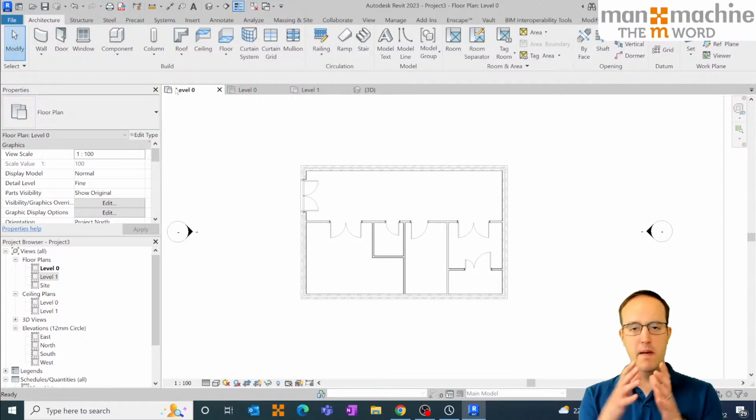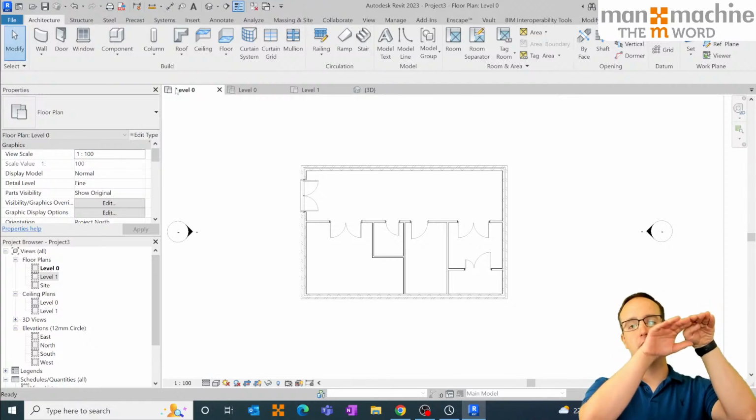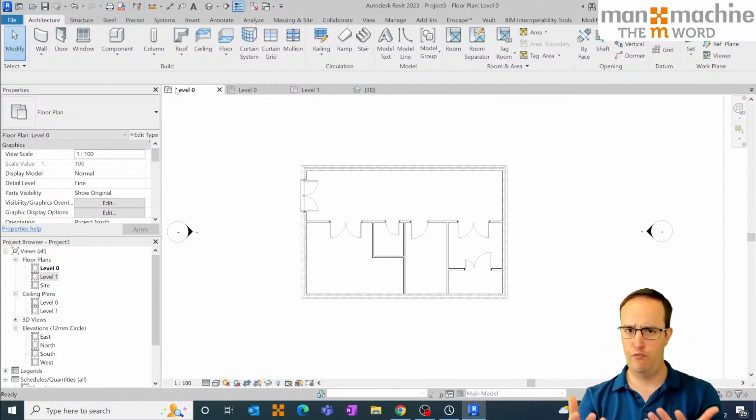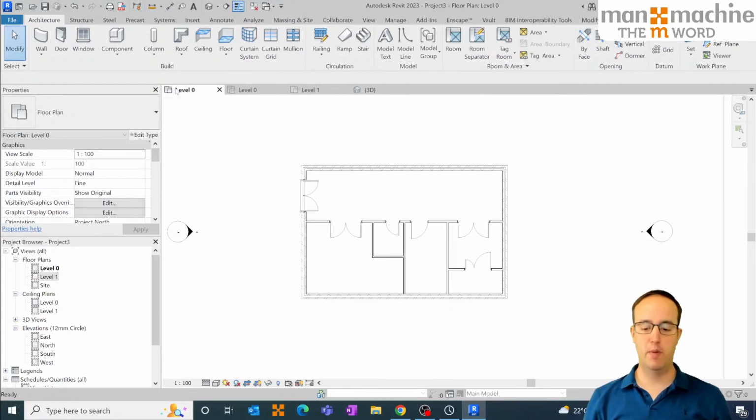Now, remember, we're working with manageable, maintainable assets. The key to this is the handover is going to need, as I said earlier, to explain what the components are and how we can find them. And COBie as a format is completely hierarchical because of that very reason. Okay, so you have a building. Within the building, you have levels. Within the levels, you have spaces or rooms, and within those rooms, you have components.